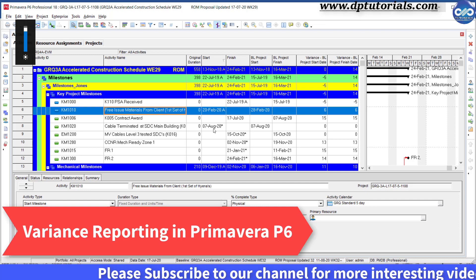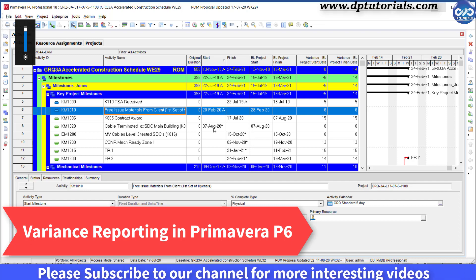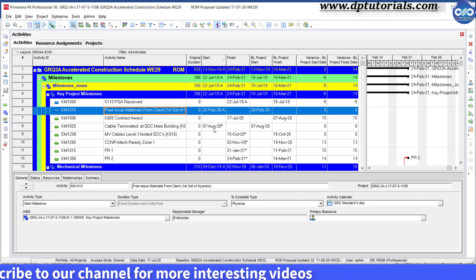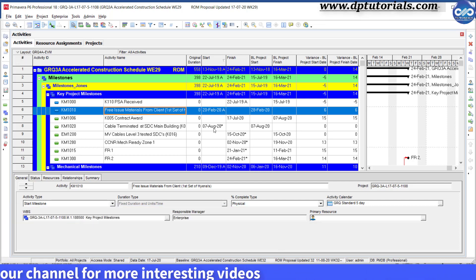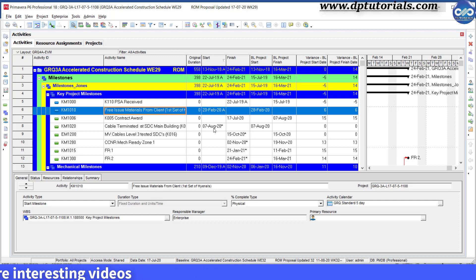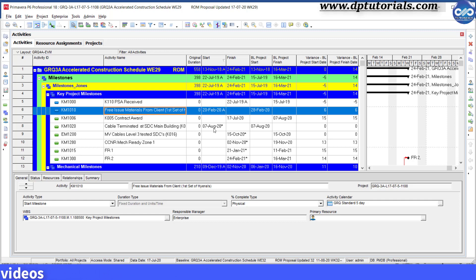Before you prepare any variance reports, you should be having baselines assigned to your project schedule, or else there won't be any variances in your schedule.